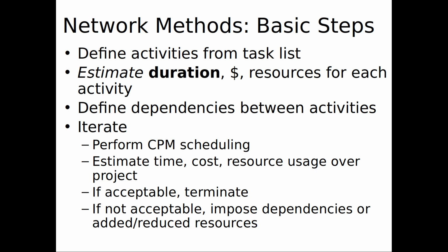Well, maybe you can also break the task up into 10 smaller tasks. Good. But with that, maybe you just don't have 10 team members who can actually work on them in parallel, if they can all work in parallel. Yeah, so that could well occur. You have only so many resources. In principle, you could have them all in parallel, perhaps for certain subtasks, but you can't realistically deliver on that because you don't have the people that can deliver. So we can't just assume they can all be done in parallel, amongst other things, resource constraints and dependencies.